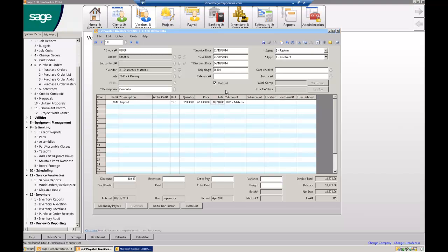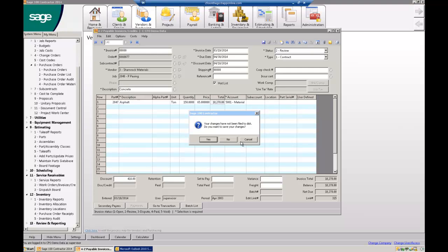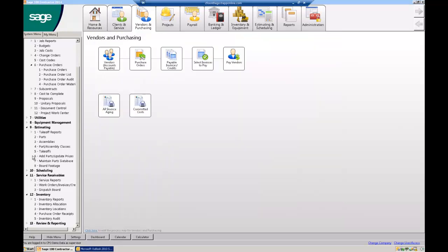So this is already in accounts payable in review status. Once somebody signs off on it, I can put that as open. It's now ready to write a check. But the good news is it's now job costed as of right now because I've received it in. It's now been job costed to that job, to the cost code that was in the estimate. So that material is received by using the material receipts option. So we'll require you to use purchase orders, but they're going to be simple to do, what have you.